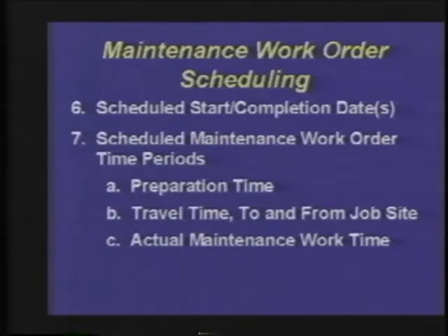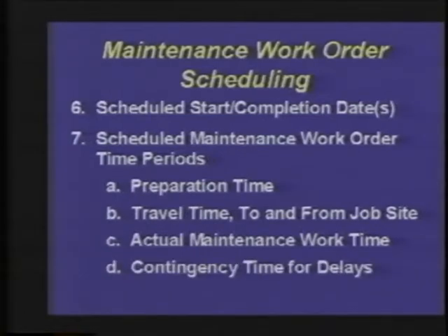And then item number 7D pertains to a contingency time for delay, and that is when you first start PM, you may want to allocate 5 minutes or so to the individual PM activities, so that as the PM program commences, the individual craft personnel would have the ability to have some time to develop their observations, their findings, and most importantly, the recommendations for operating improvement.